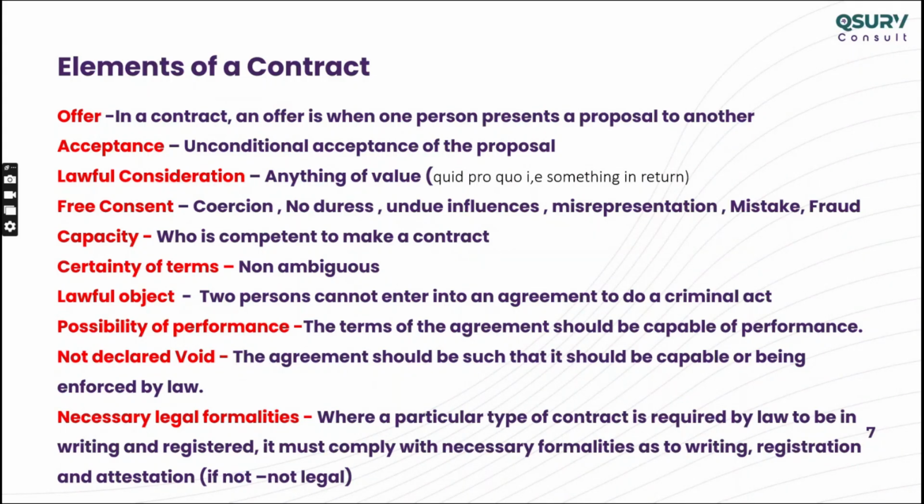Okay, but acceptance should be unconditional acceptance. If you accept in the contract, if you accept in the offer, it should be unconditional. You cannot tell him, yeah, I am not accepting the offer, but subject to blah blah things. That's not entertained, or that's not a valid acceptance.